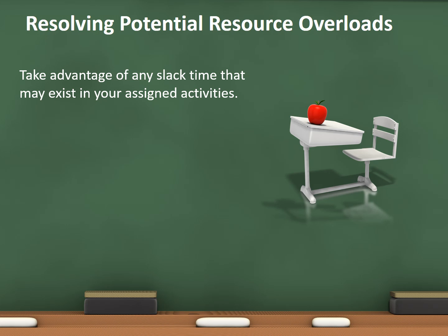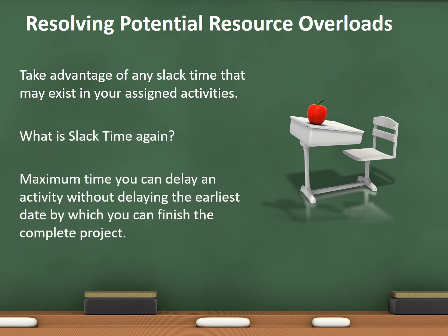Take advantage of any slack time that may exist in your assigned activities to get on to another task. Slack time, again, is the maximum time that you can delay an activity without delaying the earliest date by which you can finish the complete project.